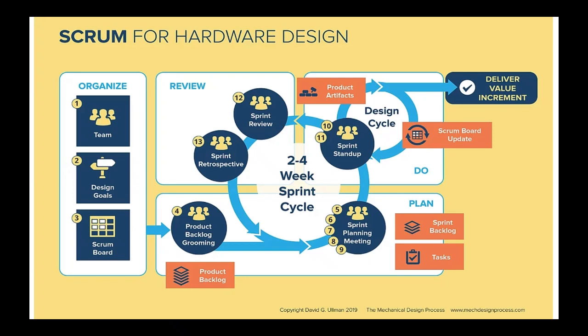And then by step 12, you're reviewing how your progress is going. That's the point of this workshop today, is to review how have you done well so far on the timeline you created in 480. And doing a retrospective. Am I on my timeline? How far off am I? And what can I do to adjust? Which brings you back in that circle from step 13 back to step 4, where you groom or manage your backlog of tasks. You're looking overall at your overall timeline and saying, okay, do I need to move pieces around? So that's the overall sprint cycle.